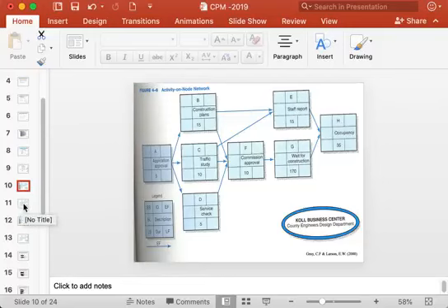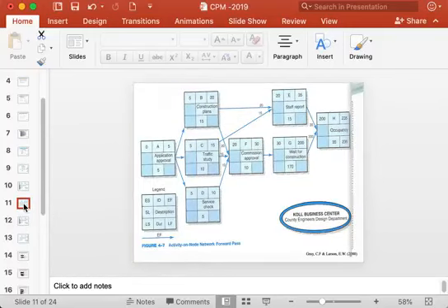So now we can look at how we can calculate the time. Let us assume that the project can start at time 0. So now activity A starting from time 0 will take its own time of 5 time units, for example 5 days. Activity A will take, for example, 5 days and finish after 5 days here.